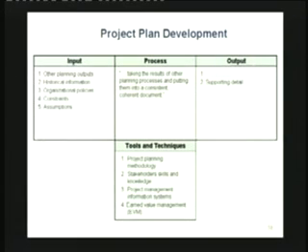And from that, of course, you get details. For example, inputs would be other planning outputs. Other projects may have run, and there may be outputs from there that are required in order for me to develop the plan. Historical information, very important. Organizational policies, certain policies may be there. Maybe people can't work overtime. That's going to have an impact, so you better know that before you start your planning process. Constraints, unions may put certain requirements, certain trades may be there, and so on. That also would be there. And then you'll have your own assumptions, things that you can't really get an answer to from outside. You'll list those.